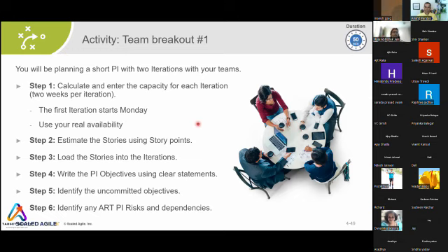I'll answer that. You don't know all the work which can be planned for so long a duration. For 2 months or 3 months, you cannot plan all the work, right? But you can plan at least 2 or 3 iterations clearly. You also have the opportunity of iteration planning or sprint planning after the PI planning, where you can refine whatever you have planned. That second level you also have.